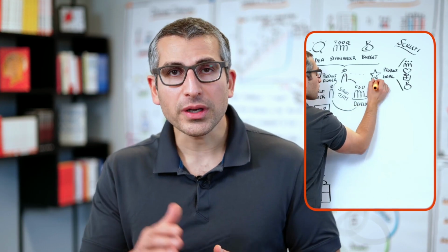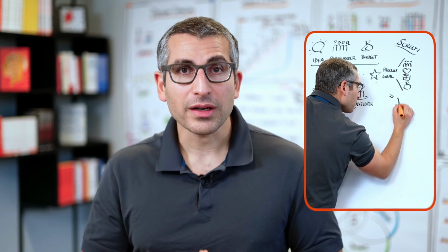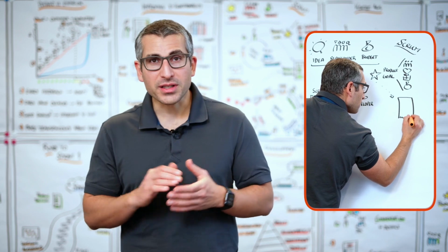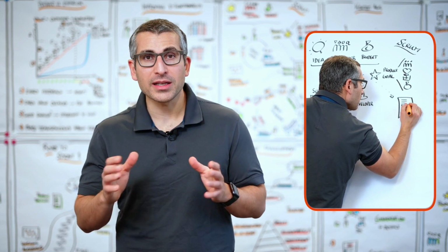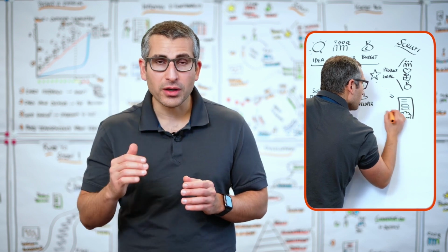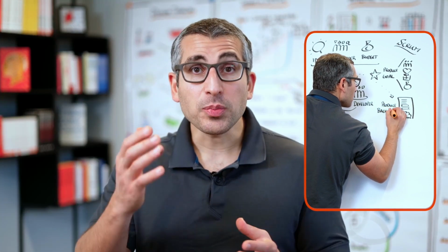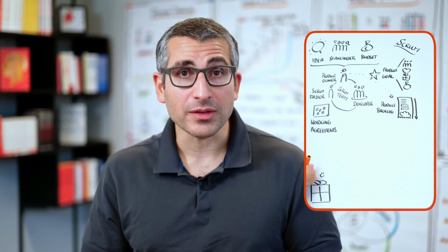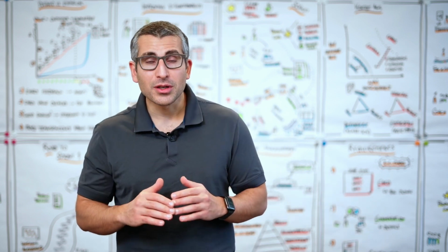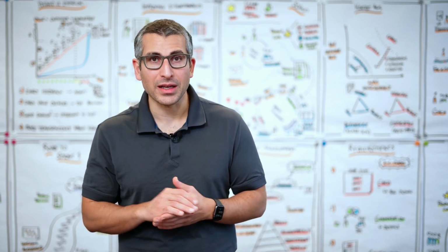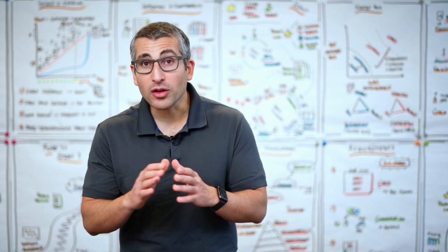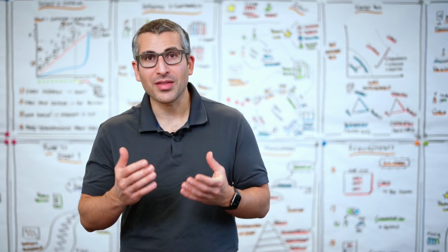From the product goal, you can create the product backlog. That product backlog, again, has 4 key characteristics. The first characteristic is that every product backlog is prioritized. There needs to be a clear order, ideally based on customer value, on how we want to build the product. Based on that prioritization, we detail the different requirements. The requirements that end up at the top should be very small and very granular, because a team should select them or should be able to select them into their next sprint. The items at the bottom can be still very vague. They can be cloudy. We don't need to have that level of detail, so we can also save the time which it takes to create that level of detail.